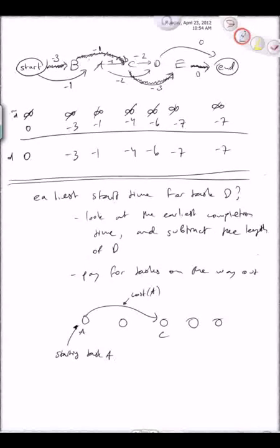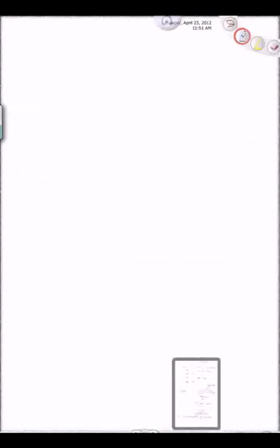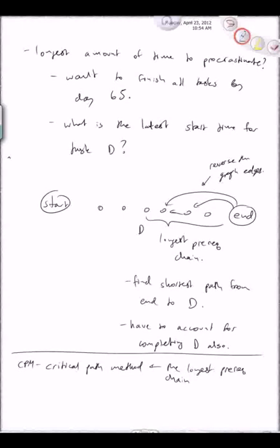And so these highlighted edges here are giving us the critical path from start to end. So it really turned out that this was the prerequisite chain that slowed us down the most, which was getting B done before C before E. And that's the path that had a total length of -7. So that's how you can identify the critical path from running things.